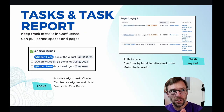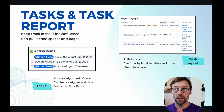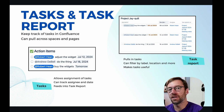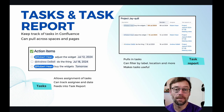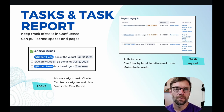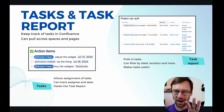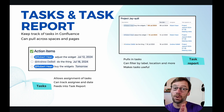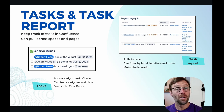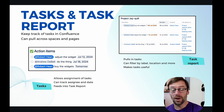The next thing I like to consider is how will I track my action items or tasks? I could go into Jira and build out a ticket for everything, but sometimes that's too much. This is where the action item or task feature is great in Confluence — it lets me add to any page an action item that can be assigned to someone, have a description, and have a due date. I can use a macro called the task report to pull all those tasks into one spot, and even filter by label — for example, every task marked with 'engineering'.